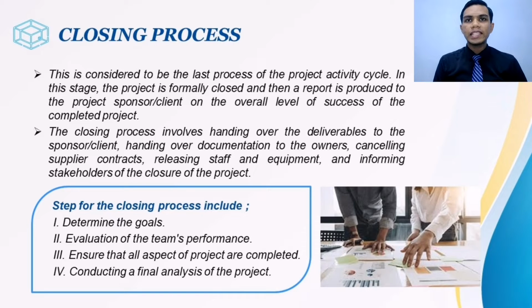The closing process involves handing over the deliverables to the sponsor or client, handing over documentation to the owner, cancelling suppliers' contracts, releasing staff and equipment, and informing stakeholders of the closure of the project.